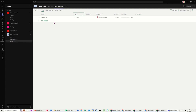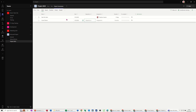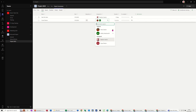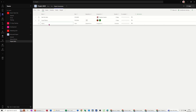You've got a start date — if you don't set one it'll just start on today's date. So the first task is Quad Teams. Start will be today, the fifth. It depends on this one being finished or accepted — that's task one. I'll assign this to Alana and Ashley. The duration for this one will be five days and it's not completed.